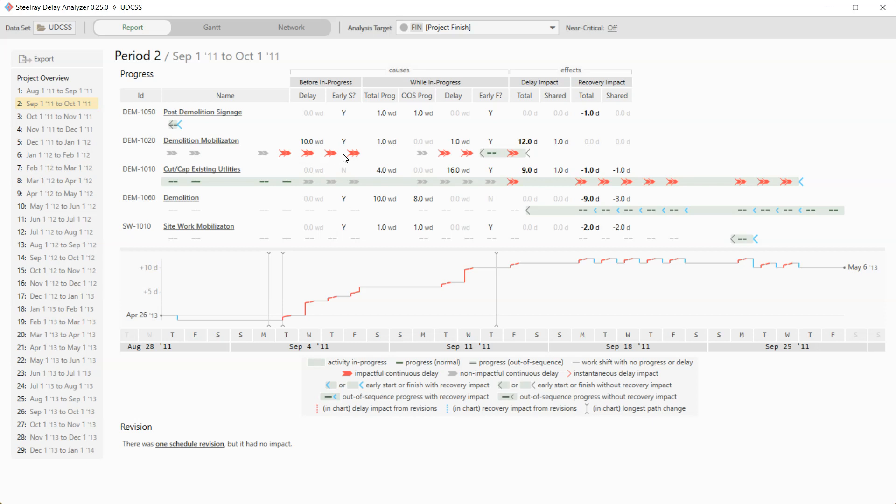But now it was delaying the finish date. And so you can see that. Over the next weekend, non-working time. On Monday, it was not critical. And so even though it delayed, it didn't move the finish date. And then you can see delay, delay. And then regular progress. That's what that single dashed line means. And then a delay. And then an early finish.